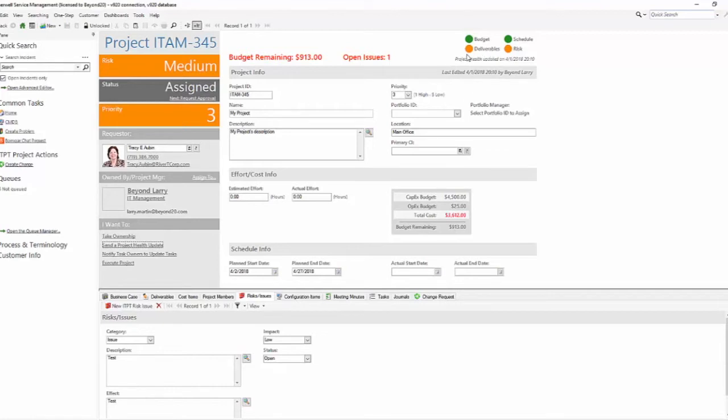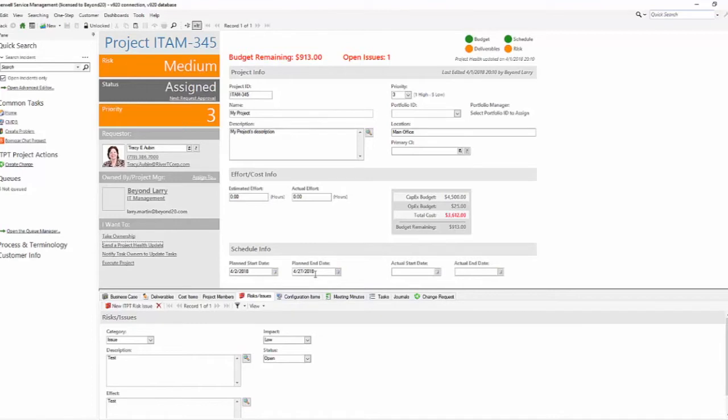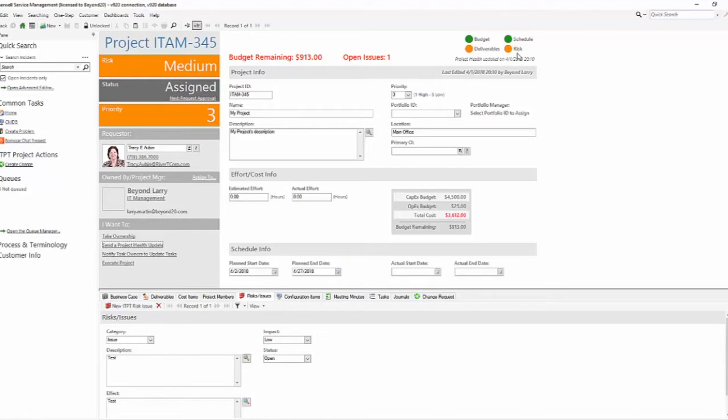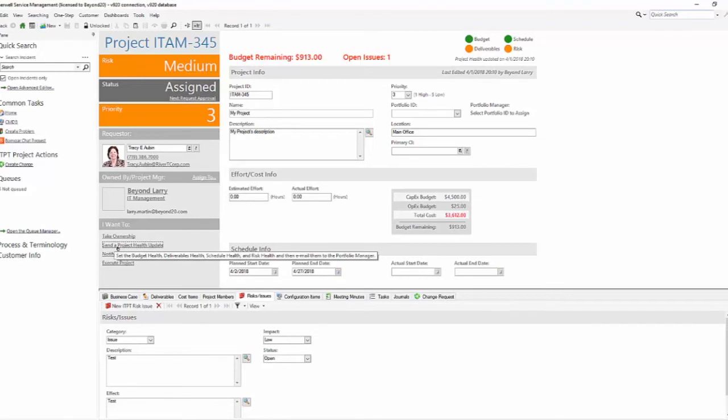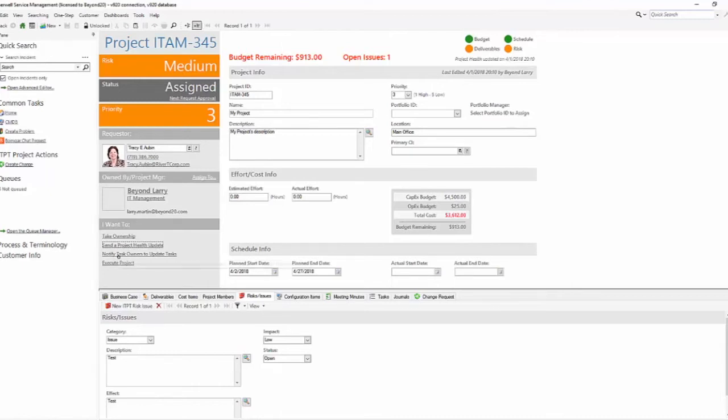So low, medium, and then high would be red. These are driven by you doing a project health update. You could obviously do some work with this and set some automation behind it to keep track of your project. For example, you might say that if there are X number of tasks open and your planned end date is less than 10 days away, you can have a number of open tasks that indicate that your project health schedule is at risk. Or if you have more than three risks that are open regardless of their impact, then your risk is high, medium, or low.